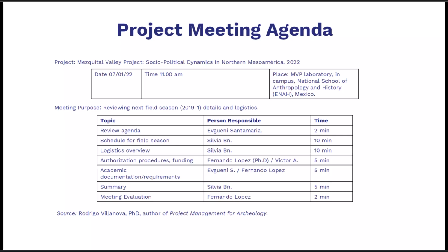In healthcare, for example, a similar pattern may be used for launching a patient portal. Review the agenda. The clinical leader outlines rollout dates. Operations covers staffing and training. Compliance confirms privacy rules and approvals. Finance verifies funding. And the project manager summarizes. End with a brief evaluation.